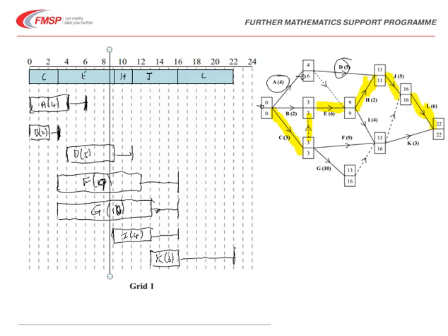So that's 1 on the critical path E, but then also D, F and G must be happening at that point. Even if we move them within their float time, D, F and G are all happening at that time. So on day 9, then each of those must be happening. Therefore, we must state that.